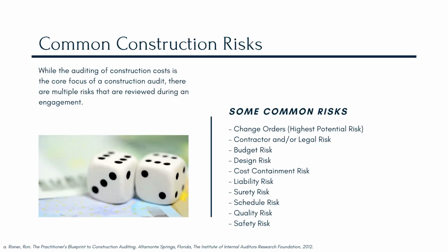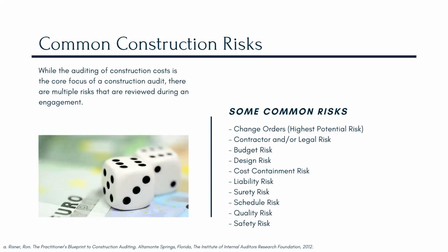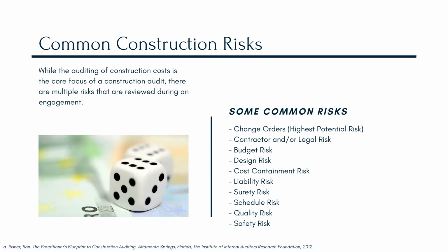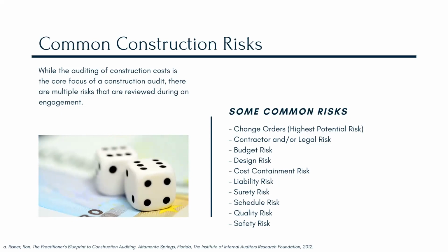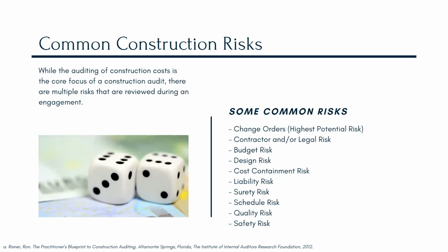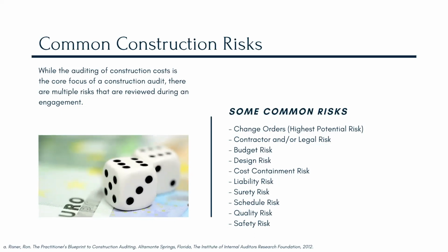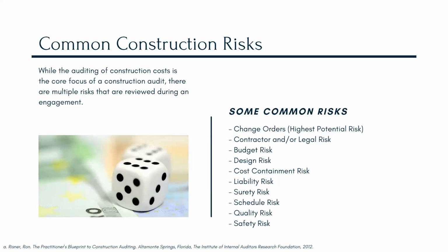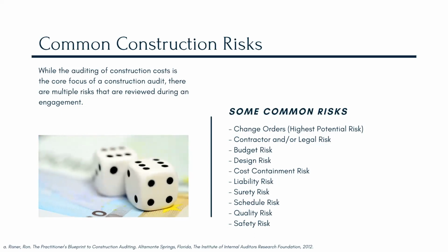But the first component is a financial component and recovery of those dollars. One way to handle it is through that retainer portion of the project that gets withheld with every pay application for this very purpose. If there's a dispute on billings or if there's a basis for overbillings, that retention can be used to resolve those overbills.